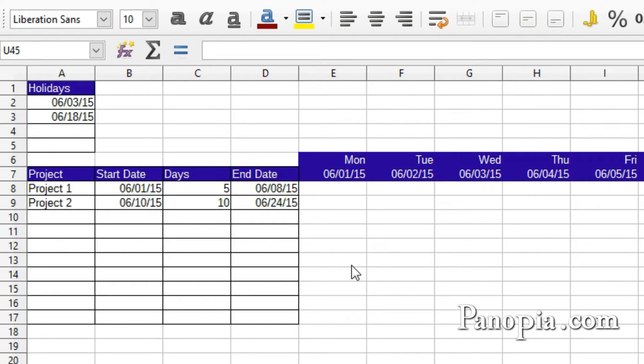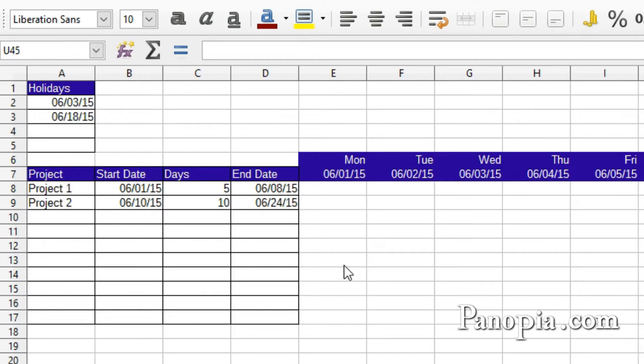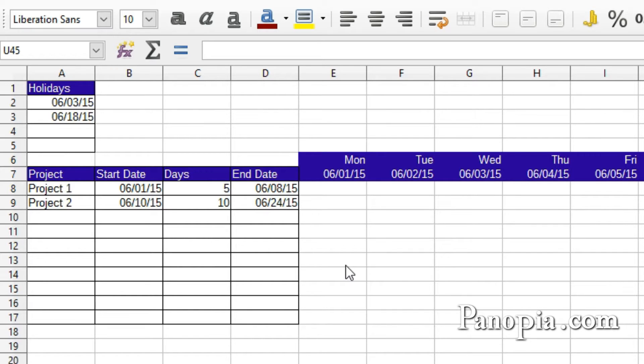This is the NETWORKDAYS.INTL function. You'll recall that WORKDAY.INTL returns the date after a specified number of workdays. The NETWORKDAYS.INTL will give you the number of workdays between a start date and end date.